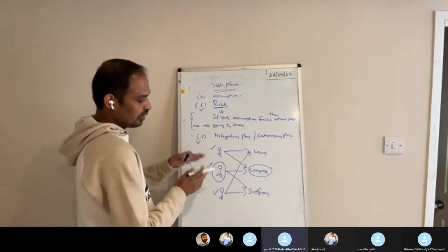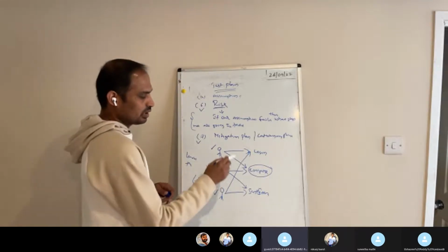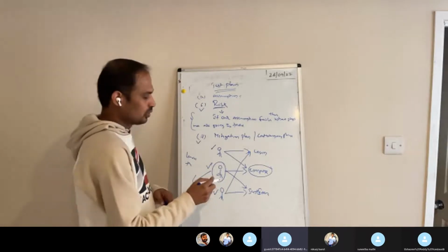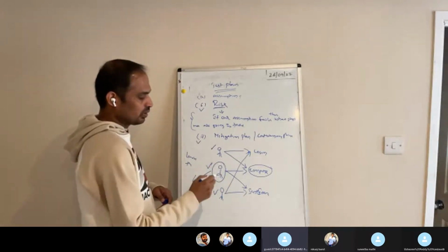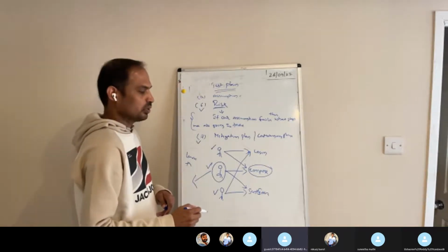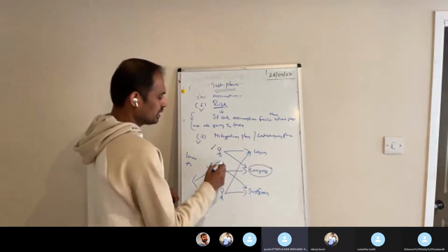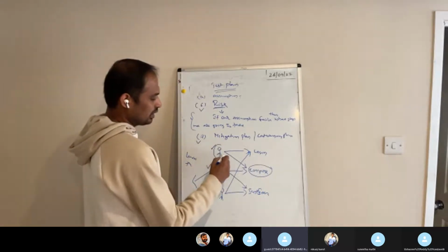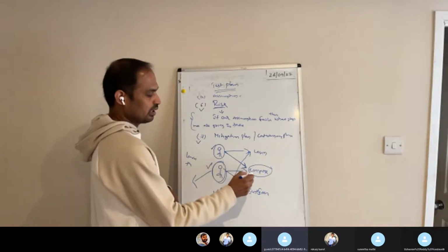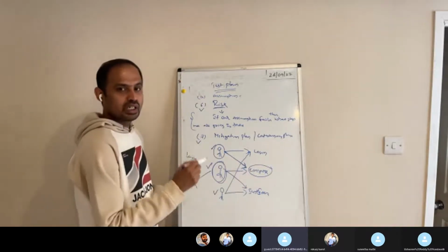So each person will have knowledge of one or two features. If any resource goes, we reduce that risk from 100% to 20%. If this guy leaves, the first resource already knows compose mail, so he takes care of it until we get a new resource.